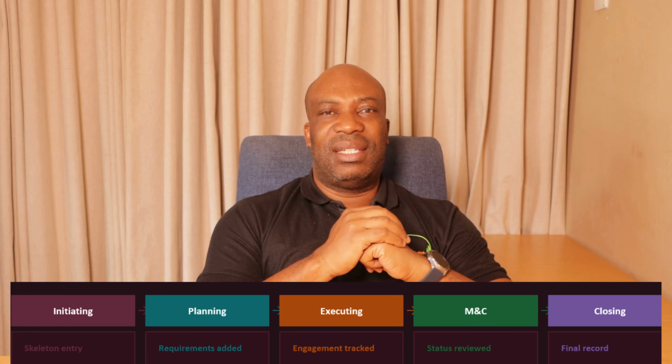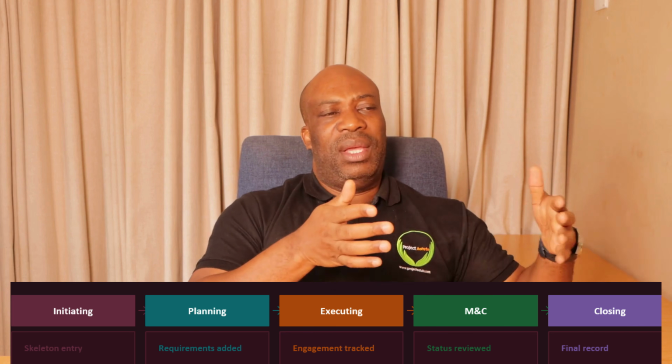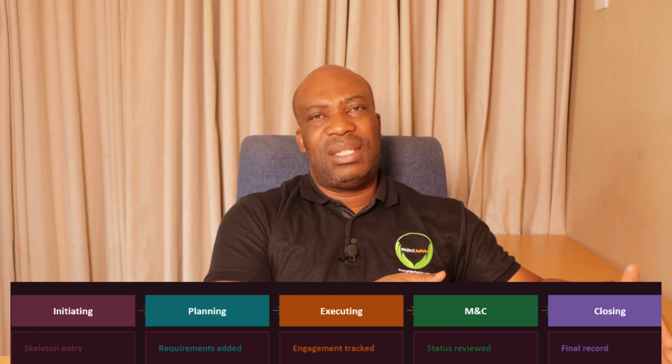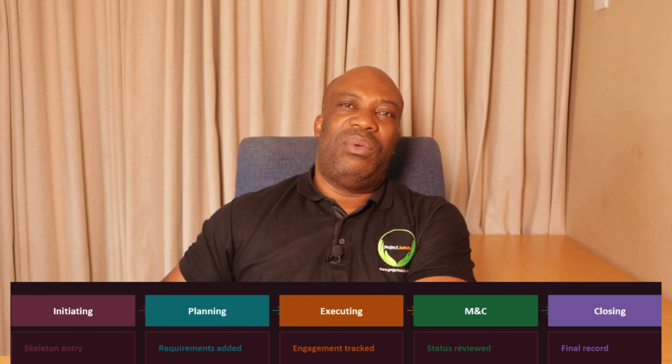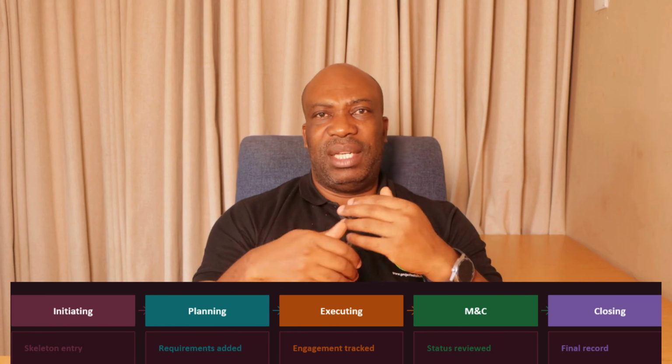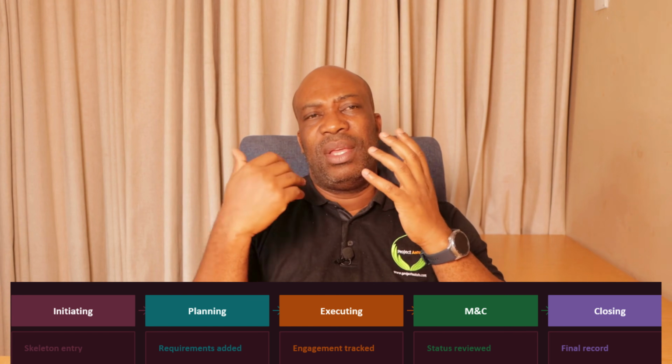Then they leave it like that. That's not the correct way of doing it. Stakeholder register must be recorded, updated throughout the project, which means from the beginning of the project all the way up to the end of the project, you should be updating your stakeholder register. So that is one characteristic that you should expect. It is a living document. It's a document that is always updated throughout the project.